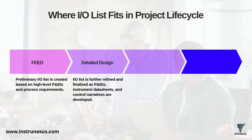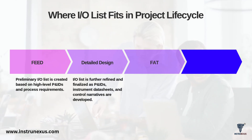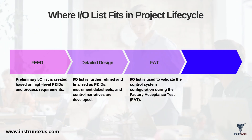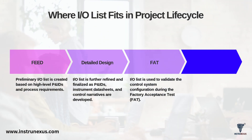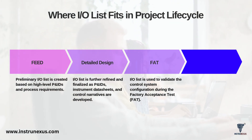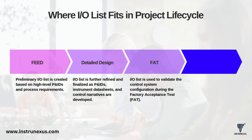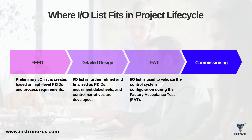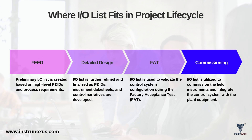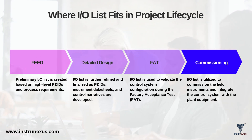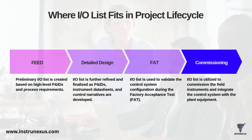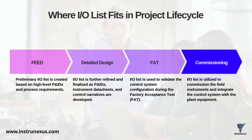Then it's time for the FAT, or factory acceptance test. The IO List is used as a validation tool to check the control system configuration against the design, point by point. Finally, during commissioning, the IO List moves to the field. It's the key document used to commission the field instruments, perform loop checks, and integrate the control system with the live plant equipment.